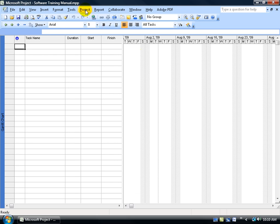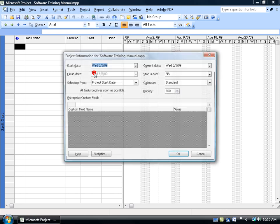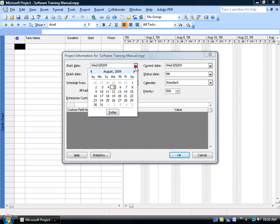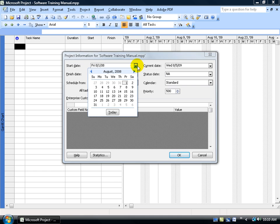to set the project start date, I'm going to come up here and click on the project menu, and go down to project information. That's the first thing I would do. Start date has got today's date. Like I said, instead we're going to go back. You can either click on the drop down arrow and scroll around, or come up here and just type in the project start date, which is going to be 2008, and it's going to be August 1st, 2008. And then just hit the tab key, so it accepts it. So when you click on the drop down arrow, it's got you right there, August 2008.